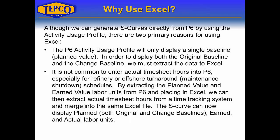Why do we use Excel to build S-curves instead of P6? We can generate S-curves directly from P6 using the activity usage profile, but there are two primary reasons for using Excel. First, the P6 activity usage profile will only display a single baseline. To display both the original and change baselines, we must extract data to Excel. Second, it's not common to enter actual timesheet hours into P6 — especially for refinery or offshore turnaround schedules. By extracting planned and earned value labor units from P6 into Excel, we can merge in actual hours from a time tracking system.